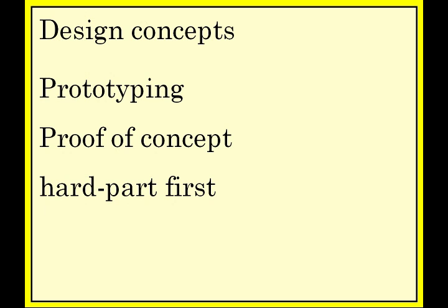This is an aspect of design that nobody welcomes, but it's pretty important. Hard part first says, as you might surmise, when you're confronted with doing design, you should begin with the hard aspects of design. That is not human nature. Typically, we would like to do the easy parts first. Why? Because they're easy to do.